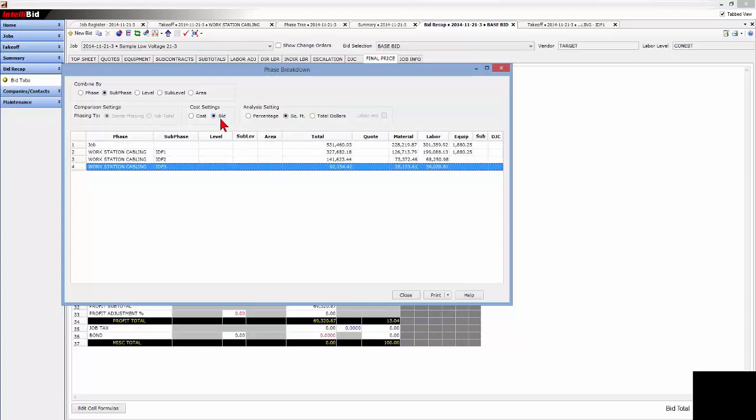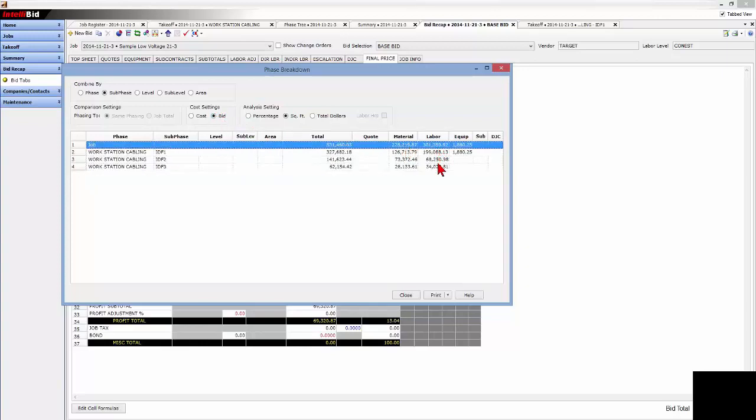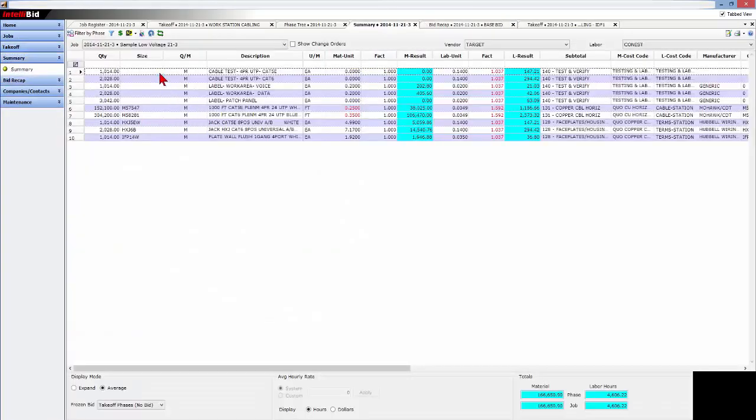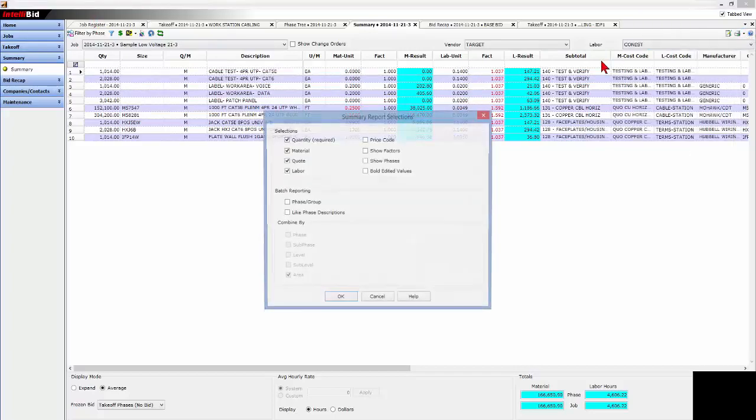with overhead and profit, material sell prices broken all down. This has got your overhead but no profit, so you can negotiate or use this as your walkaway number to help negotiate, but not go below where your cost is. And again, provide a number of breakouts. Use this as a schedule of values and export it to Excel for project management, and take your project with 4,600 hours and be able to run a number of reports.